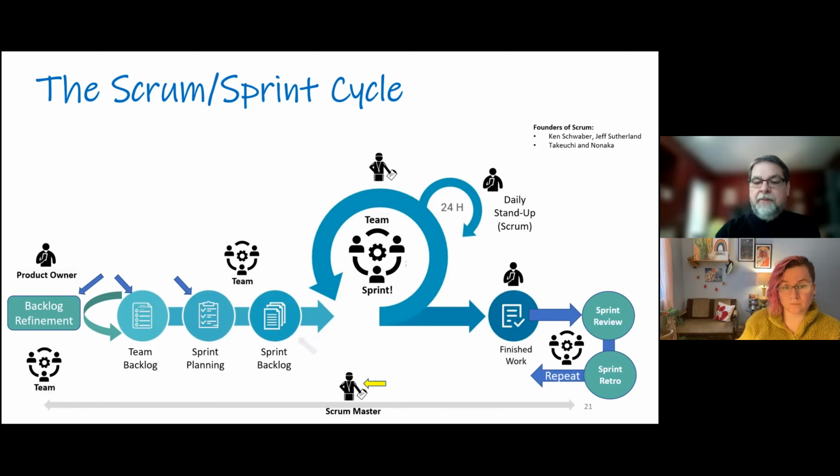Okay, let's keep going here. That's why we have our sprint backlog, and then we sprint. We run hard, the team works together, you work. And then we come up for air periodically. Now in industry, normally that's every day. They do a daily stand-up where they say, this is what I did yesterday, this is what I'm doing today, and here are any impediments or blockers or challenges or aha moments, findings, learnings. And then if we need to meet after, we schedule time to talk about it in more depth.